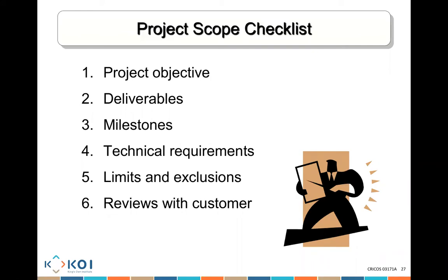But the milestone is a big achievement of something significant in your project, and it simply doesn't consume time. Like when you tell me module 1 completed, that's a milestone, but it does not consume any time. It's 0 days because the actual duration is already incorporated into the deliverable. So module 1 work, that's where there's time. Module 2 work, that's when there's time. But when you finish all 10 modules and say all 10 modules are completed, that's a milestone. A milestone always is something that does not actually consume time.